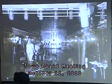A couple of just cleanup photos, just to give you a sense of this. These were the plasma arc welders. There were actually a lot of size reduction activities working in glove boxes. So you've got this protective suit on, you're working in this glove box, and then you're maneuvering stuff. Very, very hard work. If this was a standard industrial practice, say building the parkway over here, or building Mile High Stadium, you would have had probably 5 to 6 people killed in industrial accidents, just in terms of the amount of hours worked, and not one person lost a life.